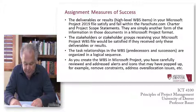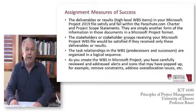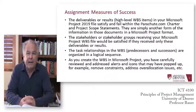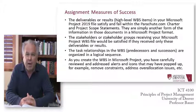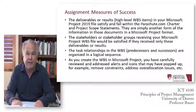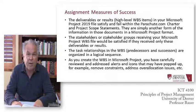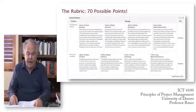Remember the stakeholder groups who are going to be receiving this file — folks at Pearson, LinkedIn, College Board, and possibly other investors — are looking at it and saying things look on track and moving well. Make sure you've assessed all the alerts and icons. Sometimes Microsoft Project will give you an error message if you've got a date with a constraint you need to meet, or if you've over-allocated resources. So keep that in mind — 70 possible points on the rubric.